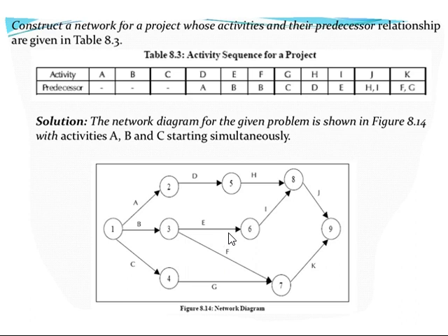Unnecessary introduction should be avoided. Multiple inputs, multiple outputs should be avoided. Looping should be avoided. Whether you have followed all of that when you construct a network diagram, you need to observe it carefully. Once you have kept all that in mind and finished your network diagram, you have completed that particular topic.